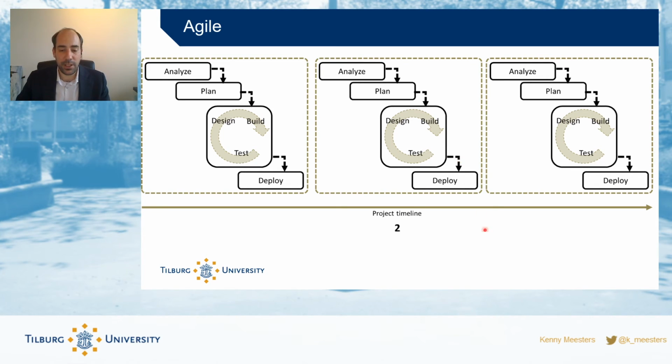What is the downside of this? If you talk about Waterfall, it is a very structured way. It requires you to think about the whole system before you start building it, which is excellent for systems that need to be very robust, that need a fixed project scope, where you need to have things done and you know what you want. So the Waterfall approach, the linear approach, is often used for projects with a very well-defined scope, where we need a very deliberate, well thought through design. For example, high reliability systems.